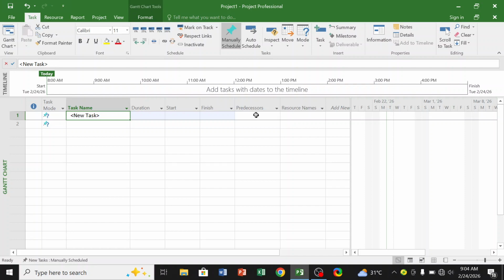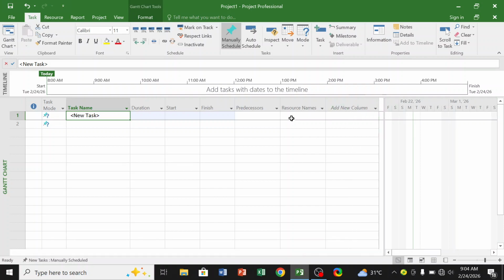For example, digging a foundation comes before concreting of the foundation. Therefore, digging a foundation precedes concreting of foundation. After that, you realize that anything that comes before must automatically have something that comes after. Now, what are those activities that come after? The activities that come after, we define them as what?